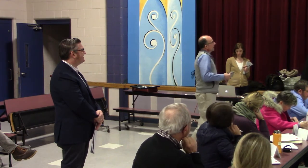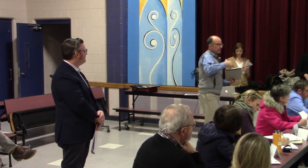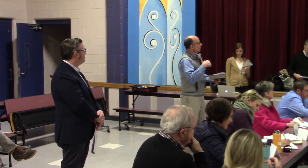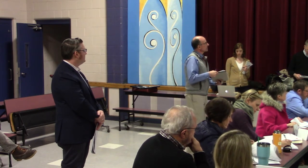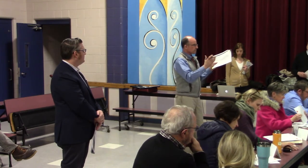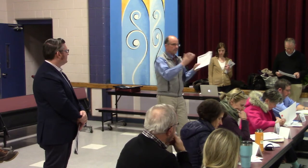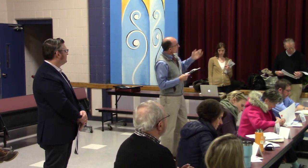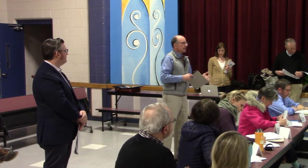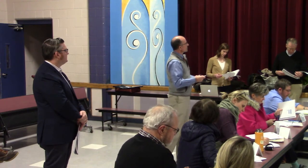Starting with renovation, based on the way the schools are situated, in order to renovate any of the schools, you basically have to move the students out into temporary trailers or temporary schools, or rent another space. We did actually do a somewhat exhaustive study of whether you could do a 3-month summer plan to turn various parts of the school over to the contractor for 3 months of the summer. Give them the school, take it back. What happens is contractors have mobilization and demobilization costs, and those add up. They leave things partially done and have to pick them up later on. We didn't think that was a big advantage.